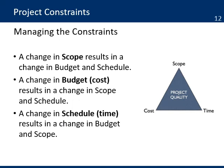It is important to understand the relationships among these constraints. Any changes in any one of the sides will have an impact on the other sides. Changing the scope — adding or reducing — requires adjusting the budget and schedule. A change in the budget, either an increase or reduction in cost, means you need to evaluate the impact on scope and schedule. Even a change in the schedule requires assessing the impact on budget and scope. Managing these constraints occurs throughout the project lifecycle, and it is an important concept that needs to be understood by project managers.